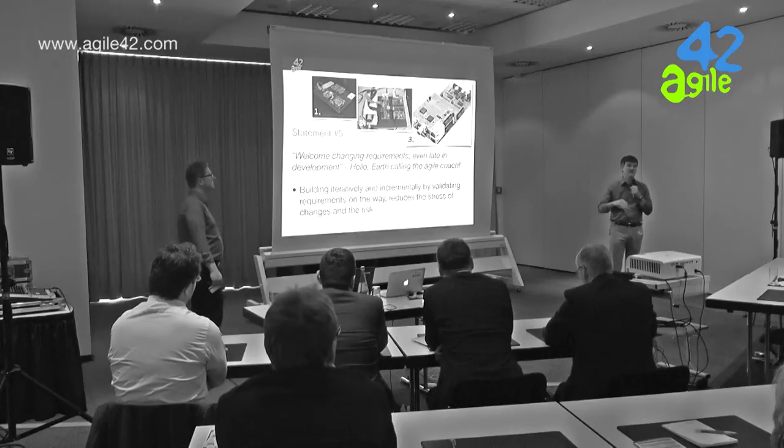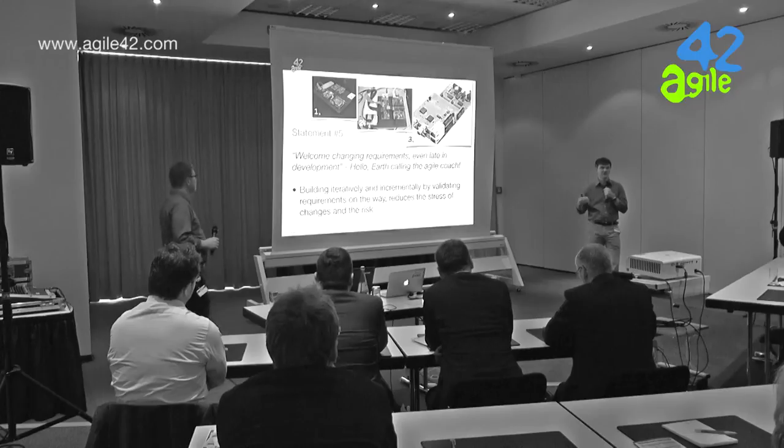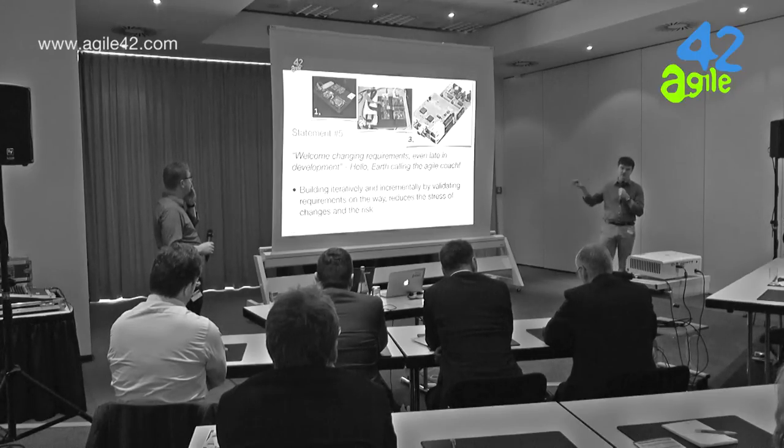So instead of that approach, we learned the hard way that it's better to have something temporary, or in some way just functional, so that we can develop all the three layers in parallel constantly. And if we come at the end of every iteration to a stable state again, which is inspectable and allows us to bootstrap the product and check it's working, then the cost of change is relatively low because we know we have a stable state.